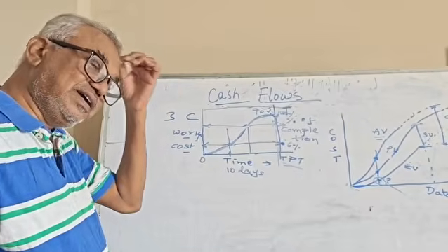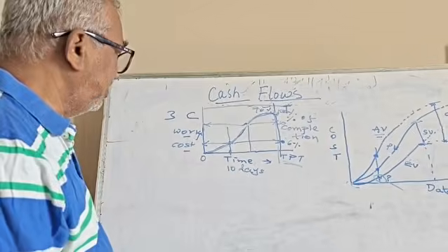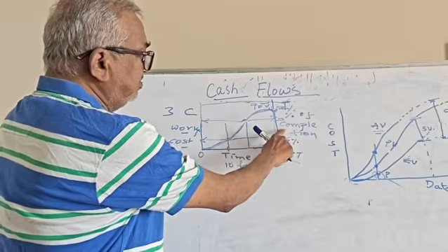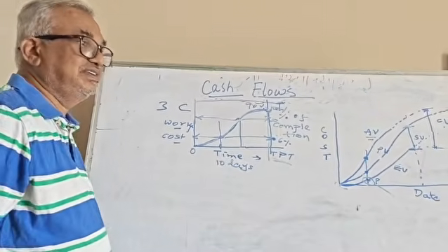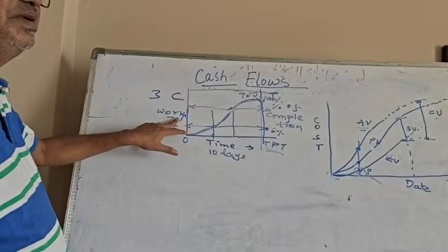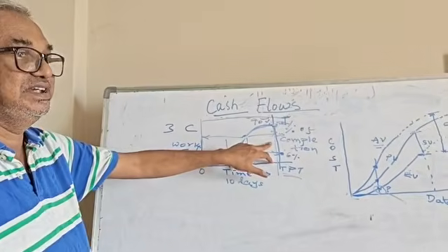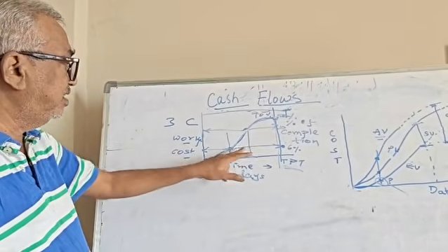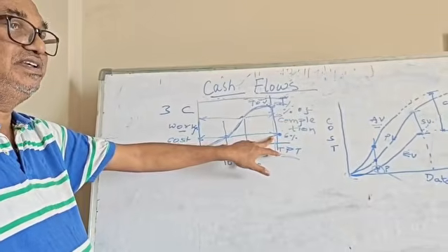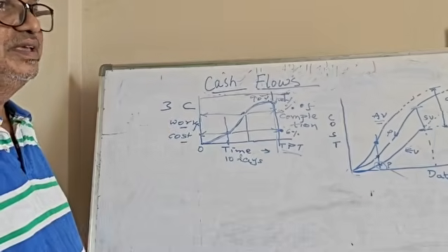Once again, we are back to a particular lecture on cash flow now. In the previous class, what we have seen is the importance of the S curve and how the money is being paid based on the completion, percentage of completion. So x-axis mostly will be time, here will be the number of activities that are completed and percentage of completion. Now once you get this value, I told you whatever be the percentage of completion is there, that much amount multiplied from BOQ, you can give it.